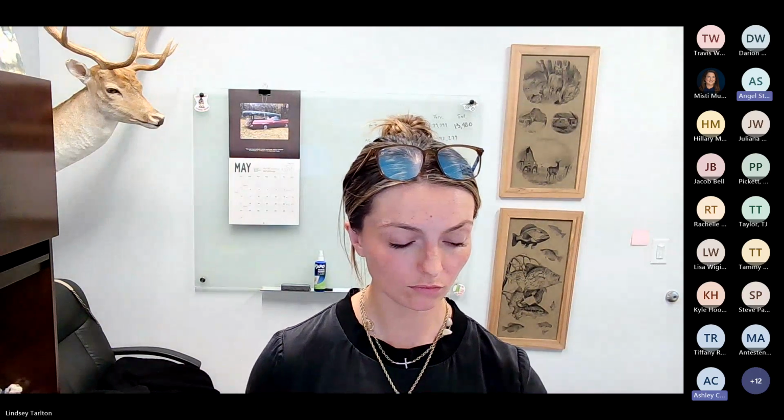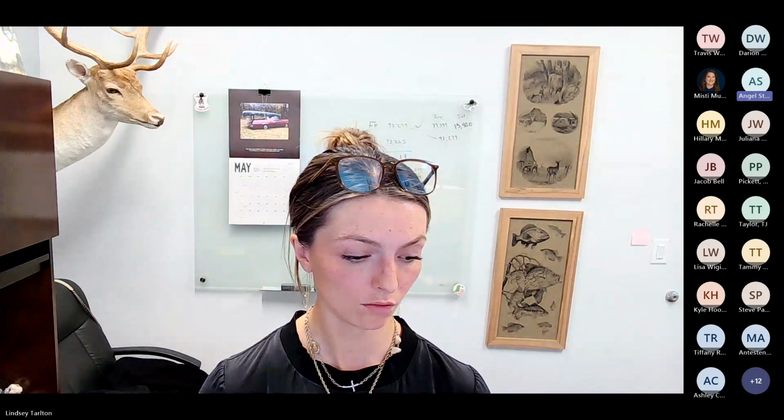So with the caveat that you guys can only incur expenses on those limited permissible activities, nothing construction related until you have attained your NEPA clearance and also received your notice to proceed from our office. Okay. Does that include getting the design started so that we can have something to submit to NEPA? Because it's hard to get environmental approvals without knowing where we're going. Engineering design, I believe, is specifically listed in the limited permissible activities.